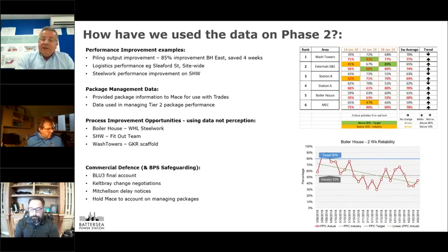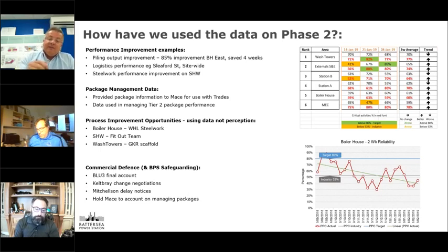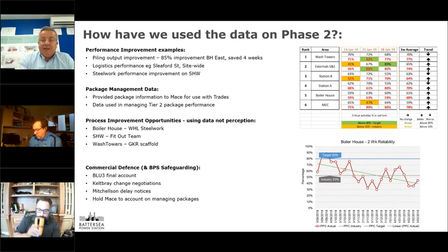So we have lots of data coming out, and the data is only as good as how you use it. So I deliberately showed you a team that wasn't going particularly well back in the day. So I picked something from fairly early back in the project. And this stuff happens, but you don't know where you are unless you can measure where you are. So for me, having that data and feeding that data back to the team so they can say, okay, we're only achieving 1 out of 2 things we plan to do on a daily basis, that's the imperative then to improve.